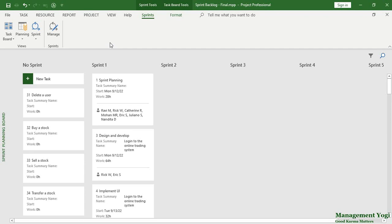We have prepared our sprint backlog. Now let us understand some key points while working with a Scrum project. Key point one: while working with a Scrum project, we usually use four views. The four views are: sprint planning board view — shown here — which gives information with respect to all the sprints in a project.